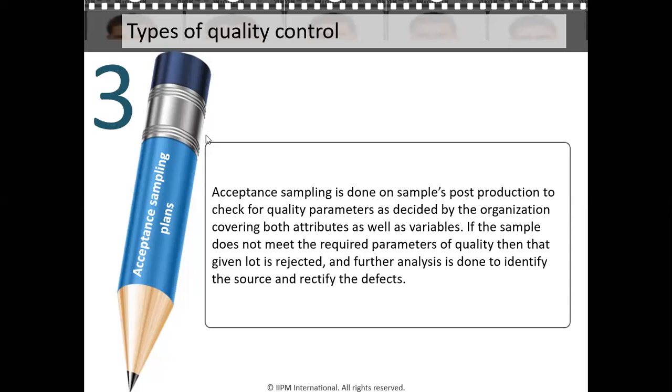If we find the features as they were stated in the very first scope of the project, then we accept. If not, the project may have to undergo rework, or the project owner may reject the project.